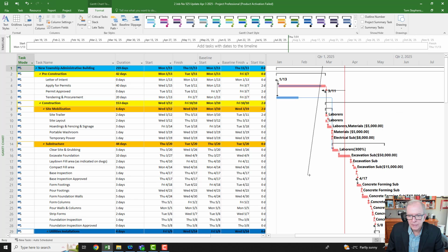So we're basically updating in that zone here. I'm a little bit off with my line here, but just so that we're absolutely clear on that. So this is what we're updating, this zone, what's happened in the last month. We can't go back here, it's done. These parts back here have already happened. So it's just between these two lines. So that's an update. So what has changed?